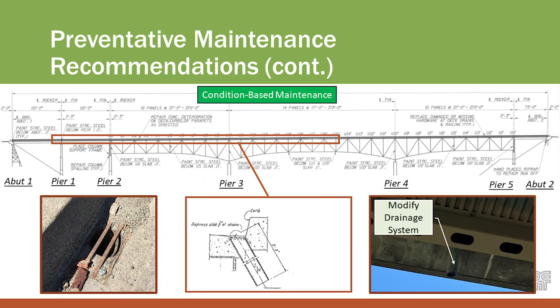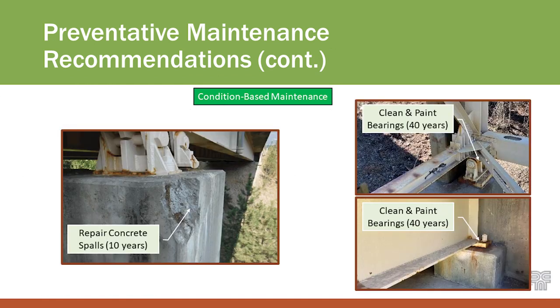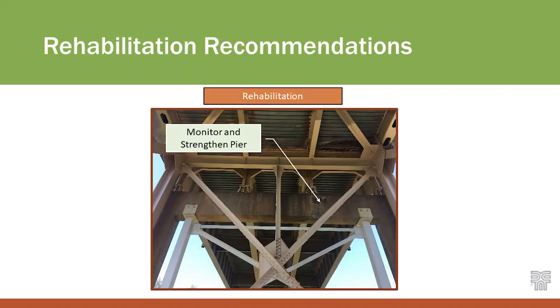There's also some miscellaneous pier patching and spalls — standard patching. When the paint projects are conducted, we want to clean and repaint the bearings. For rehabilitation, there's a pier that was previously repaired; right now we just want to monitor that pier and keep an eye on it. There's also another pier with the same detailing that would be monitored as well.